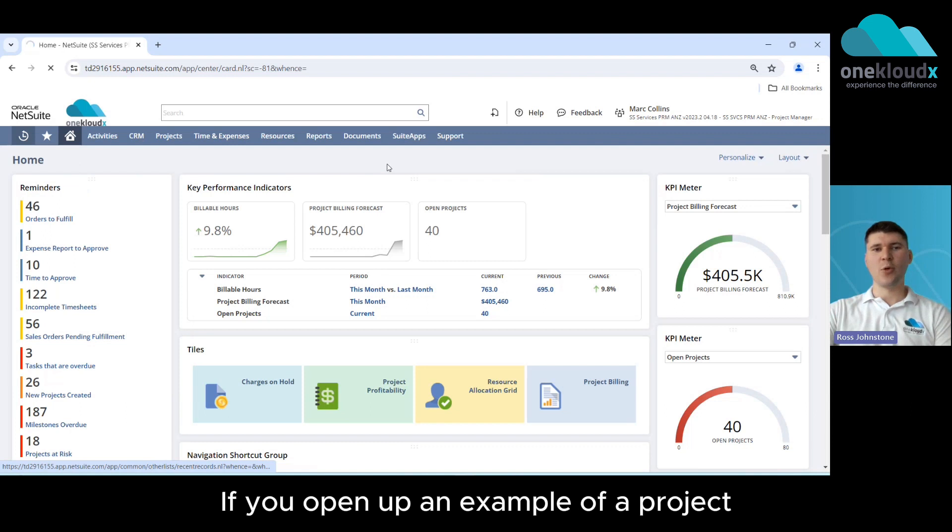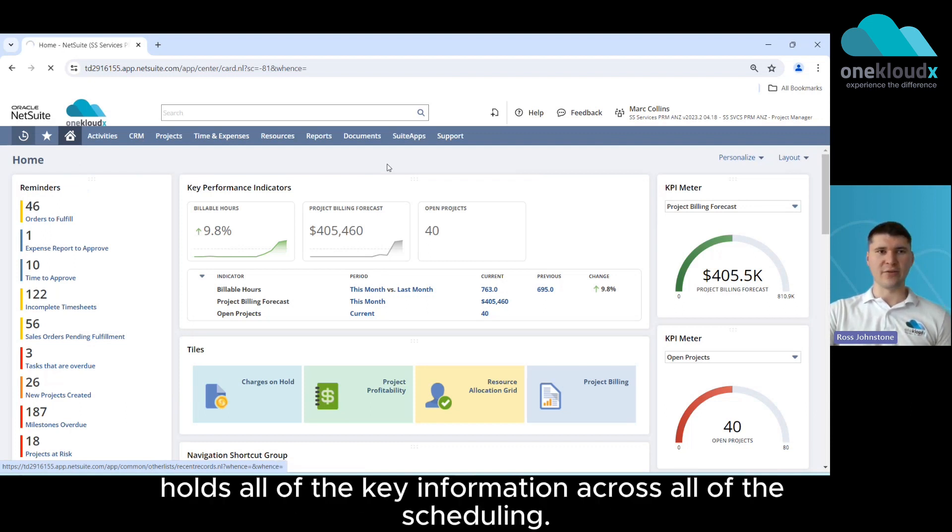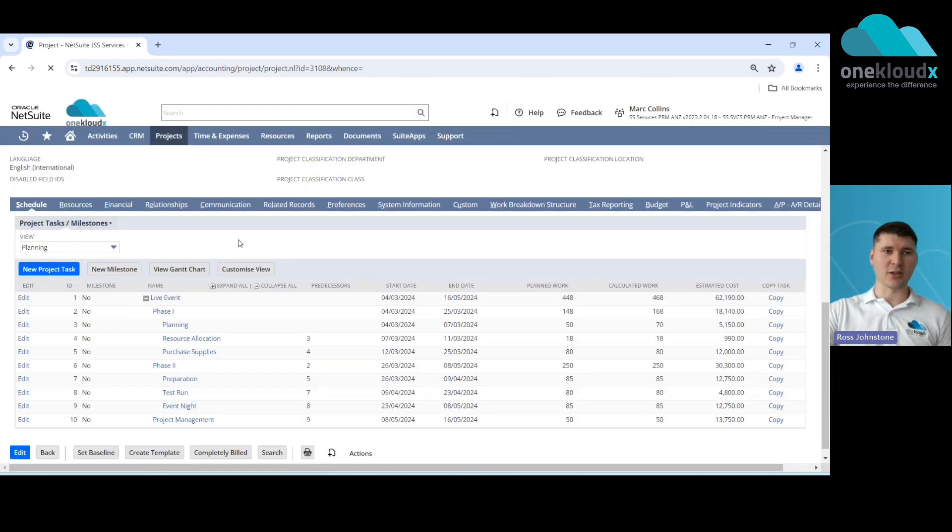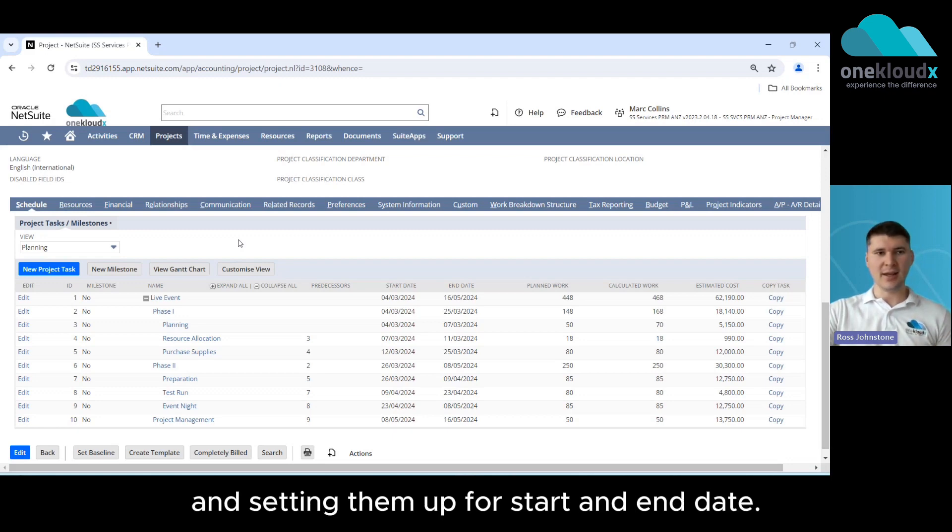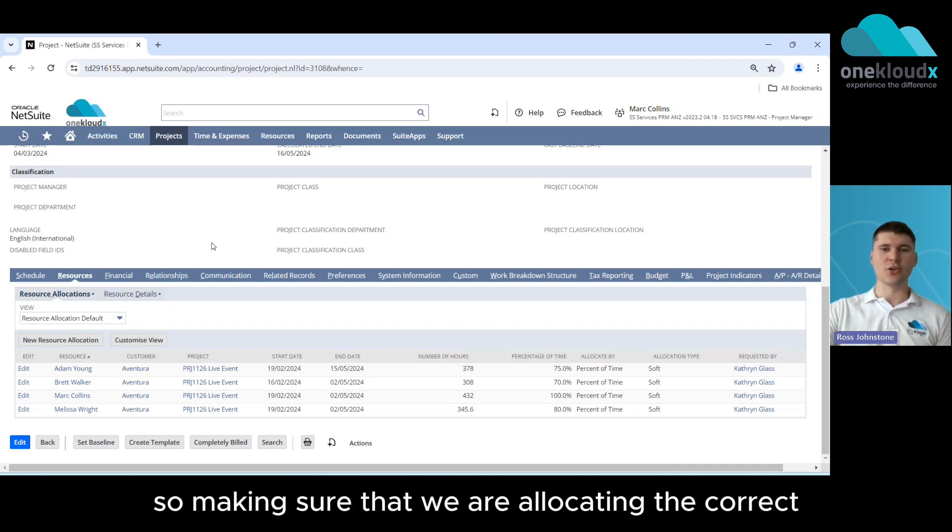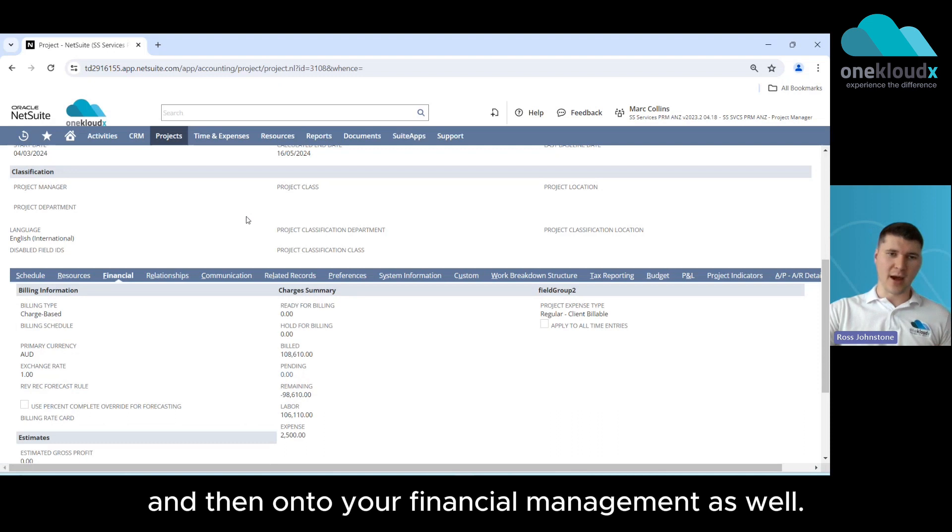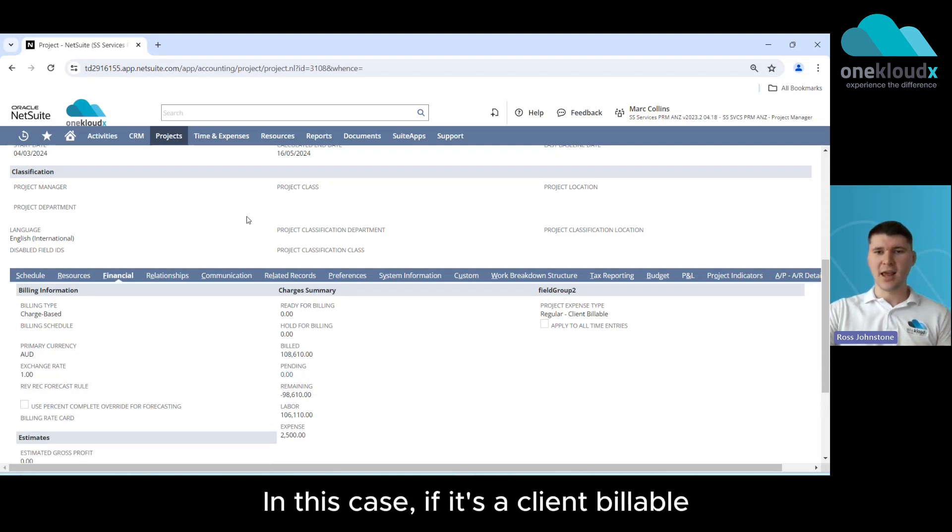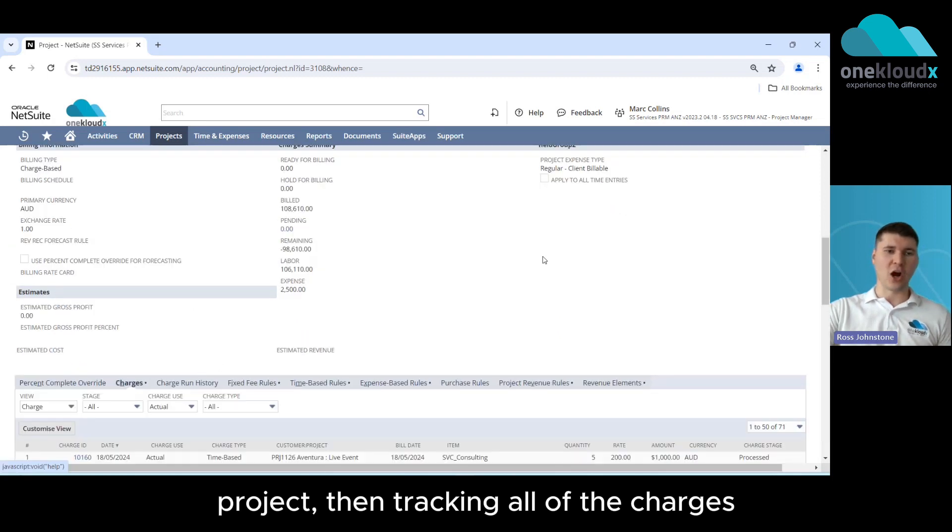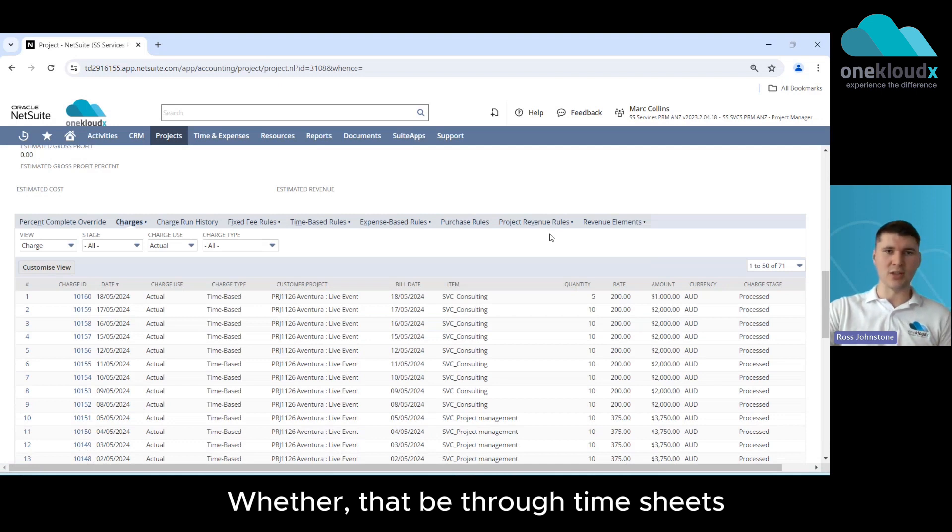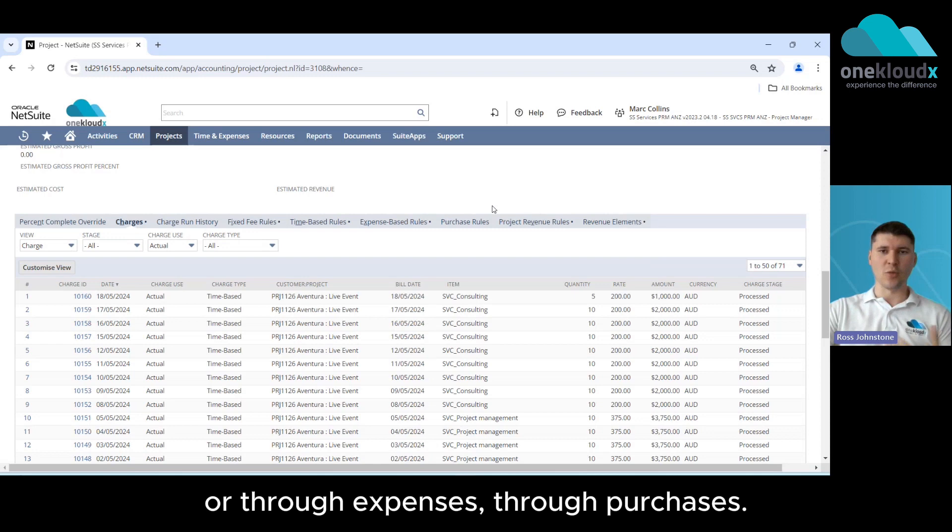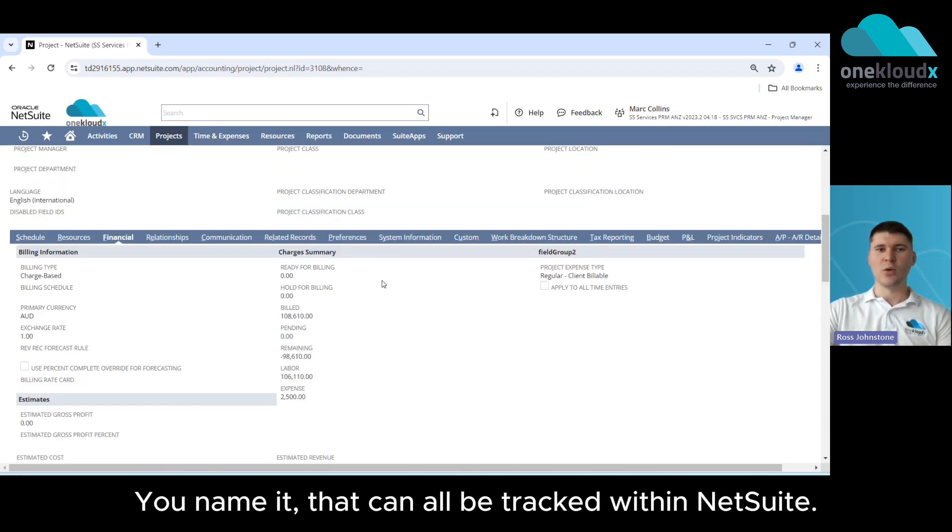Now if we open up an example of a project within NetSuite you'll see that it holds all of the key information across all of the scheduling, so first of all the project tasks and setting them up with a start and end date through your resource allocation, making sure that we are allocating the correct resources to these tasks, and then on to your financial management as well. So in this case if it's a client billable project then tracking all of the charges which are associated with this project whether that be through time sheets or time spent by our resources or through expenses through purchases, that can all be tracked within NetSuite.